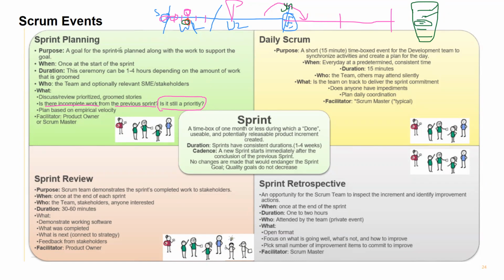Suddenly Vinay will say, okay, Jay, I will help you. Fine, so we both work together and complete this. Somehow the team works together. So the daily planning is nothing but the daily Scrum. Most companies in the industry get the wrong impression that the daily Scrum is a status call. No, that is not a status call. It is a planning for that particular day towards your sprint goal.